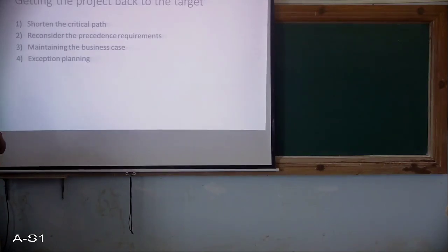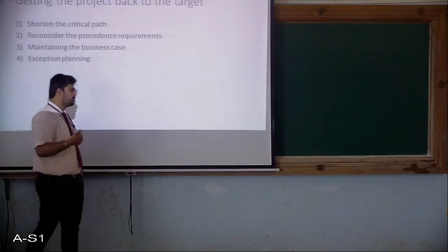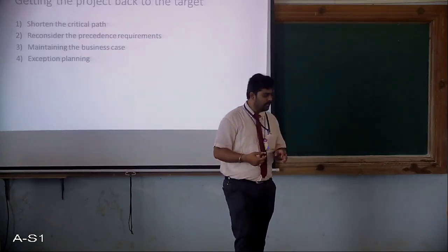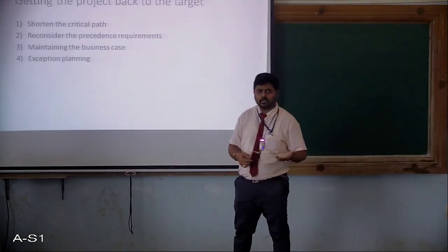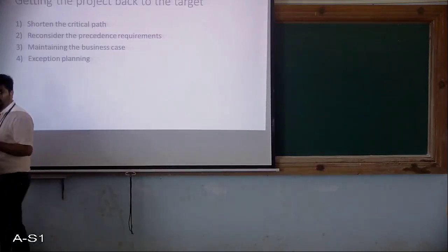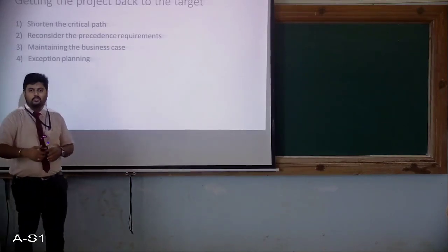The main concern of the project sponsor, who is the stakeholder putting in the money, is whether the business case for the project has been preserved. If the value of benefits of the project is greater than its cost, then it would be viable. So maintaining the business case means you need to take care of the sponsors first, and then how much you are investing and how much profit you are getting out of it. It should not happen that you invest a larger amount and get less profit, because then it will not be viable for that particular company.